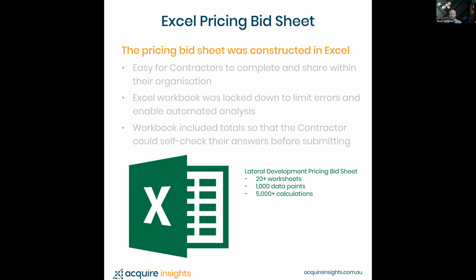So we looked at some other methodologies. We said, can we use some sourcing software or tender package software, where suppliers literally have to go onto a portal and fill in all the information? We found that on these large projects, as much as it's easy for contractors to fill in the information online, there's a whole lot of approvals they need to go through on their side.